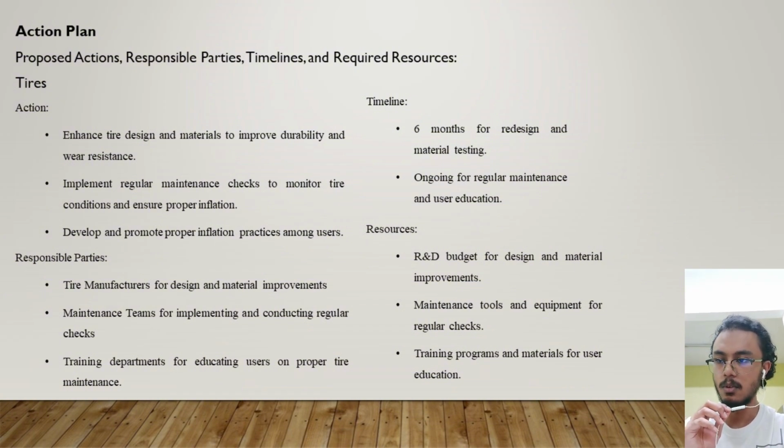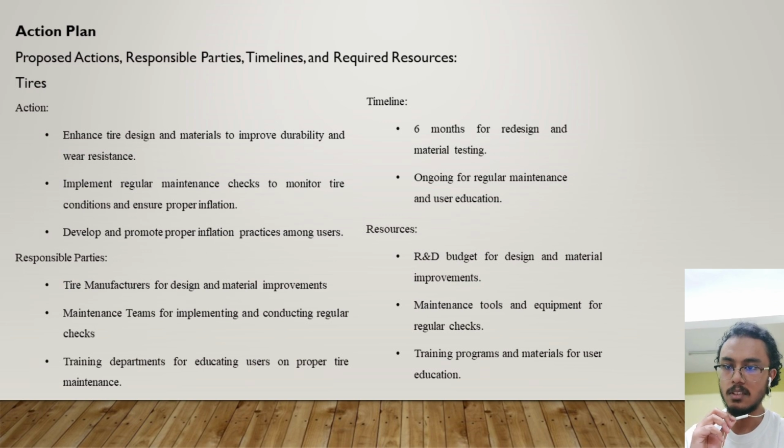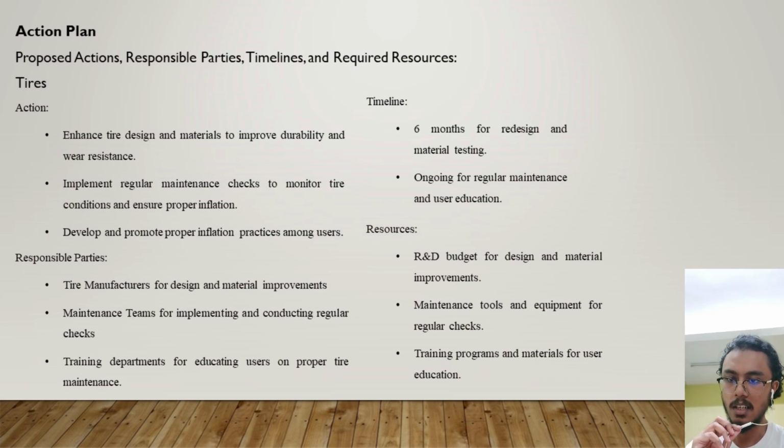among the users. The responsible parties would be tire manufacturers, the maintenance team, and the training department for educating users on the proper maintenance. For the timeline, it would be 6 months for redesign and material testing, and ongoing for regular maintenance and user education. The resources we need are an R&D budget for design and material improvements, maintenance tools and equipment for regular checks, training programs, and materials for user education.